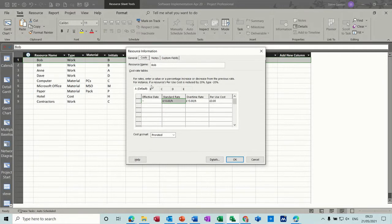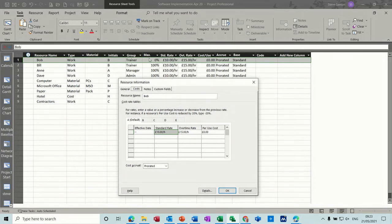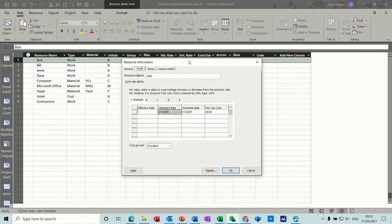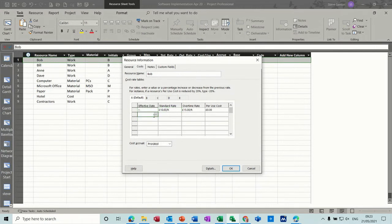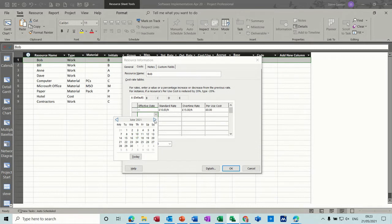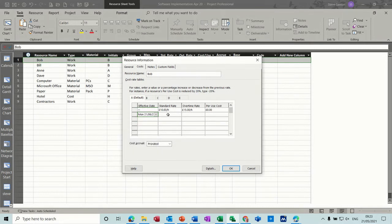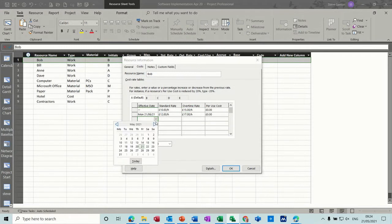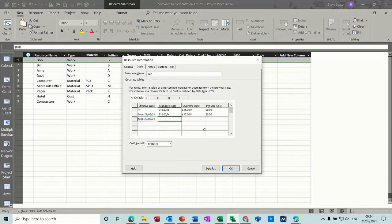You've got cost tables where you may have a standard rate — the same rate I've just typed. You can see zero is not available until Monday. Let's say on the 21st of June he's going to go up to 12 pounds an hour and overtime will be 17 pounds an hour. That's only for a week — perhaps it's a dangerous job — and then he goes back down to his normal rate on the 28th when he's due back.